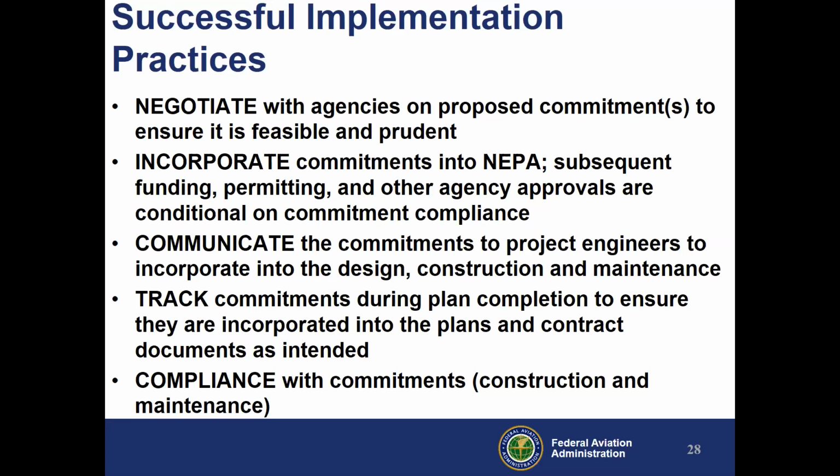I have been attending pre-construction meetings to communicate commitments so that contractors understand. In particular, tribal consultation is a very unique situation, having people on site monitoring construction.